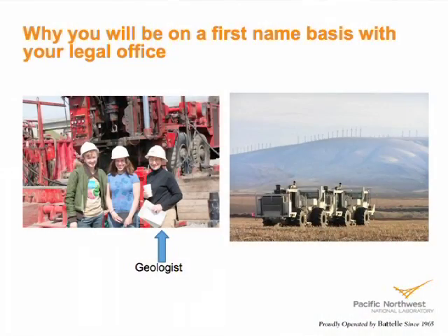So you're running these trucks over the surface, and you're going to have to get the landowners, depending on how many there are, to agree to let you run those trucks over the ground. And if you happen to damage something there, an irrigation pipe, other infrastructure, wells, whatever it may be, you're going to be liable for fixing those problems.